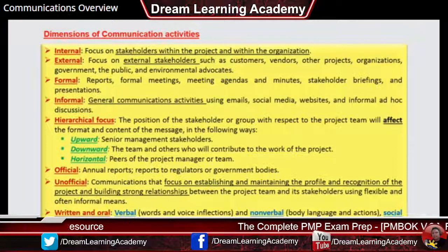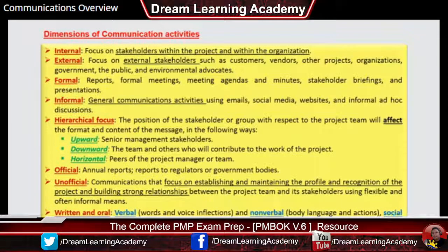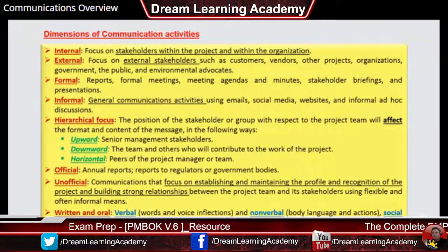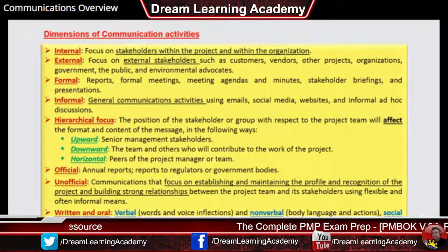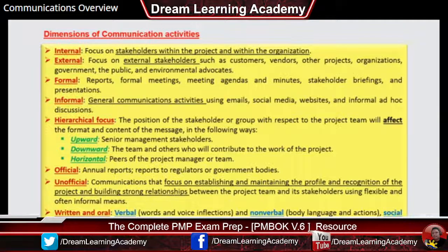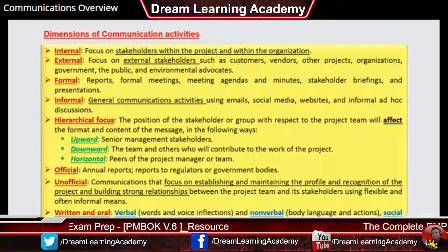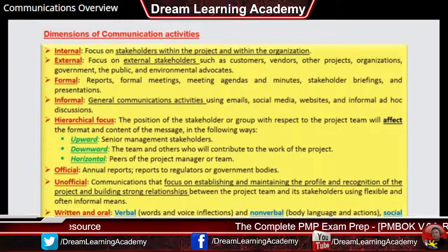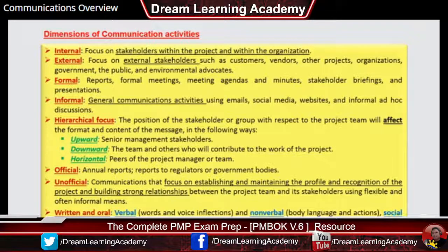Hierarchical focus depends on the position of the stakeholder relative to the project team, affecting format and content — upward to senior management, downward between the team and contributors, or horizontal between peers. Communication may also be official, such as annual reports to government authorities, or unofficial, focusing on building recognition and relationships. Finally, written and oral communication may be verbal through words and voice inflections, or non-verbal through body language and actions.